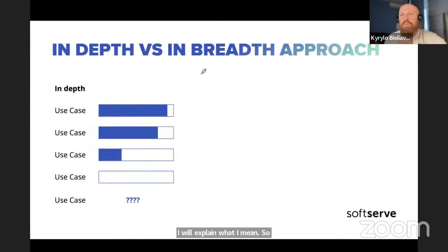The mistake that you may want to avoid during the discovery phase is trying to go into detail about every use case or every feature that you see. The discovery phase is not about having detailed requirements. As we said, we have a really limited time frame, so don't try to have the specification as a result of the discovery. Don't try to have all the detailed requirements ready. It is impossible because you have a limited time frame.